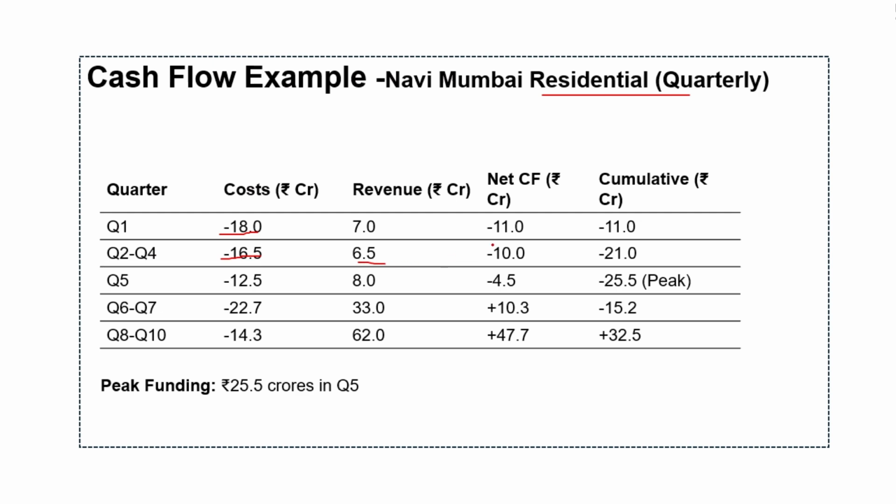Now it has started. So earlier we had a net cash flow of minus 11 crores, and then we started raising, resulting in negative 10 crores quarterly. Then in Q5 we saw the peak funding period with cost of 12.5 crores and revenue of 8 crores, creating a negative cash flow of 4.5 crores